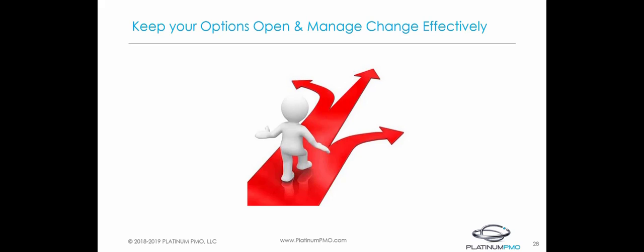Managing changes to the original scope of work is critical for keeping projects under control. It is important to use change control forms to analyze the impact of changes with respect to the time, cost, and essentiality. Program managers are fully responsible for not only tracking these changes, but also testing those changes before implementing them. Although these activities can take a lot of time, they can reap rewards when it comes to resolving scope creep issues. Again, I want to emphasize, if you follow the processes provided in the lesson, you'll be able to properly assess the cost-benefit of the change and have a full understanding of the impact that this change will have to your overall program with fully vetted alternatives to choose from.